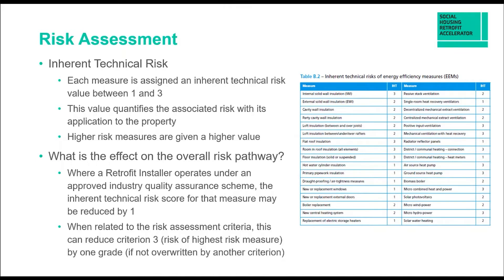These IHT values can affect the overall risk pathway. Where a retrofit installer operates under an approved industry quality assurance scheme, the IHT score for that measure may be reduced by one. For example, EWI is quantified as an IHT of two, but if the installer is approved under an industry quality assurance scheme operating under PAS2035, that IHT value can be reduced to one. This could reduce your overall risk pathway — for example, from a B down to an A — which has a knock-on effect on the project you're running.